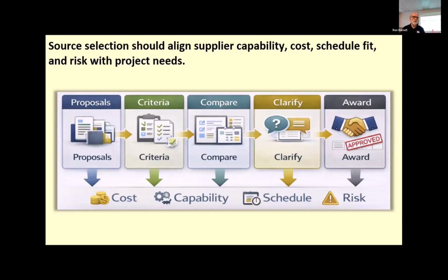So we had to balance that. But that's typically how we would take all these proposals and then evaluate them. And we have in the class notes, I describe this step as evaluating supplier bids or proposals using predefined criteria such as cost, quality, delivery schedule, and performance, and other things like financial.